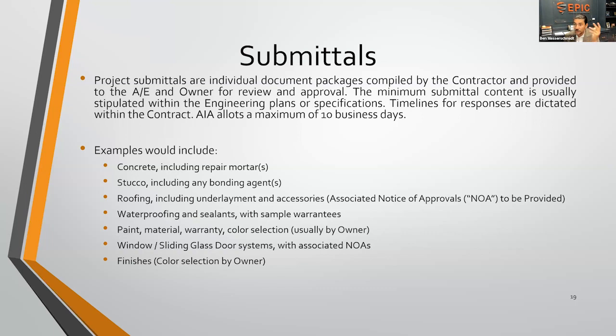The timelines for the responses should also be dictated within the contract. Typical AIA gives you a maximum of 10 days for the review. That's usually going to be the engineering review from the contractor. And here we have some examples that you see below.